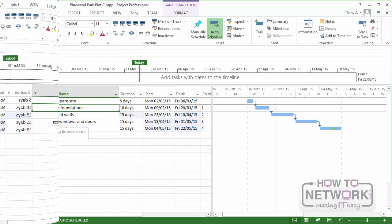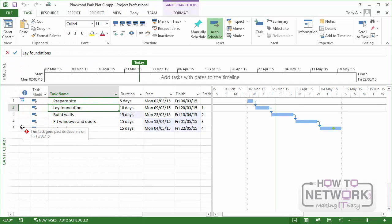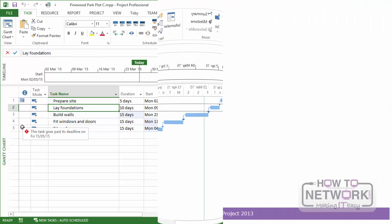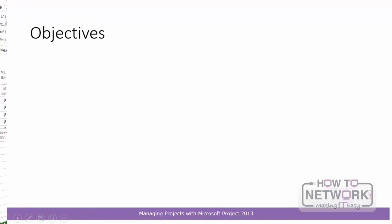Now, something I mentioned much earlier on in the course was that you can't schedule from a start date and to an end date. You have to choose one or the other. But I said there was a way that you could sort of get round that. And in fact, you can use deadlines and, for that matter, constraints to sort of get down the limitation of either scheduling from start date or end date. For example, by saying the project start date is this, but you could take the last task in the project and set either a constraint or a deadline on that. And depending on which one you set, project will enable you to identify whether you're going past that end date.